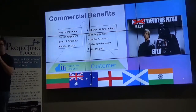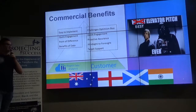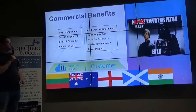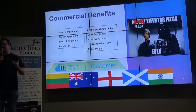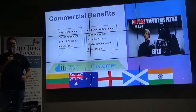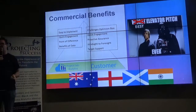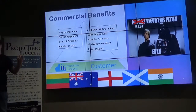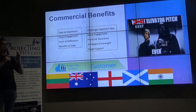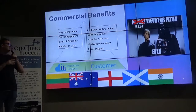From a customer or client perspective, you can challenge optimism. When projects come in with a forecast, you can say — based on the data from previous projects — that's a lot of codswallop, and challenge it. It's also proactive assurance. Most PMOs aren't proactive — they're using lagging indicators like project status reports or actuals versus forecasts where actuals have already landed. Hindsight is not foresight. And targeted support means you can actually target support to impacted areas. If a particular portfolio is a problem child, rather than focusing on everybody, go work with them for a couple of months, uplift the capability, get them tracking properly, and deal with the critical few.